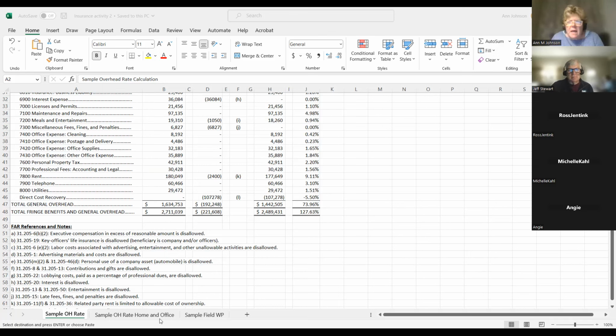So that means that for every dollar you pay somebody to work, MnDOT will reimburse you for that dollar plus 27 cents. Plus a dollar 20 cents. Yeah. So if you bill $1, then if you have $1 of direct labor, then you're billing $2.27 for that dollar.